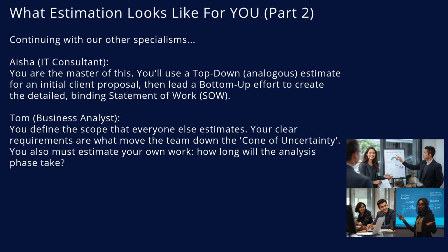Tom, as our business analyst, you are the enabler of good estimation. You are the one who defines the scope by writing clear requirements. Without your work, a bottom-up estimate is impossible. You also need to estimate your own work. How long will the analysis phase take? You'll estimate the time for workshops, interviews, and documentation.